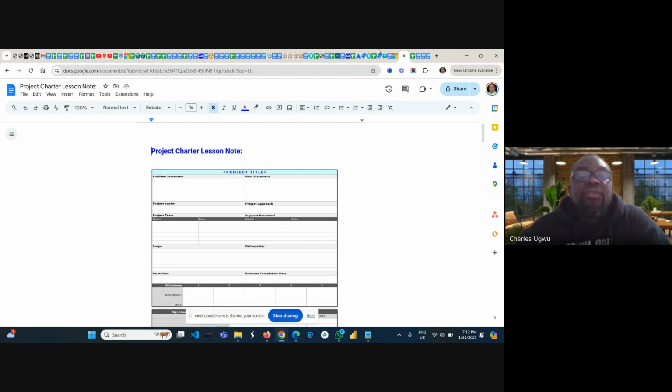Define the project vision: discuss with stakeholders to understand the purpose and objective of the project. Focus on the business need and how the project addresses the business need. Identify stakeholders: determine who will be involved and affected by the project, capture their expectations, roles, and level of influence.